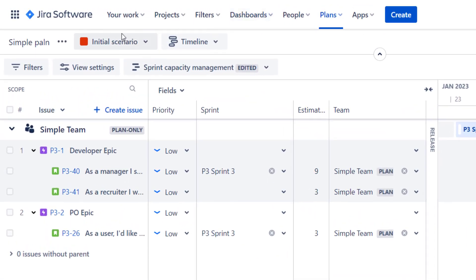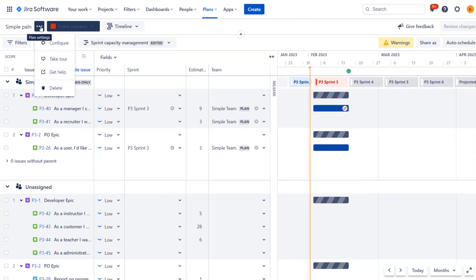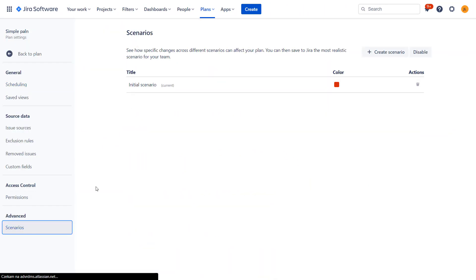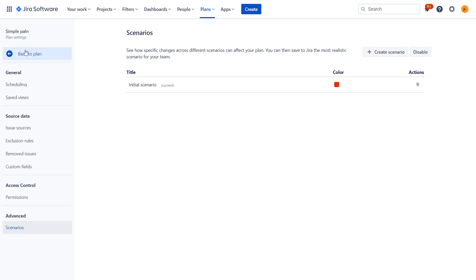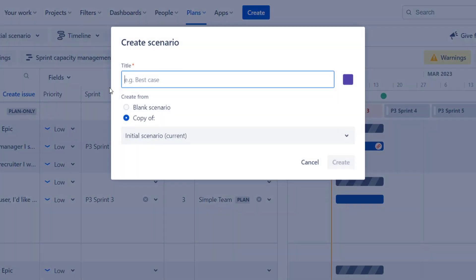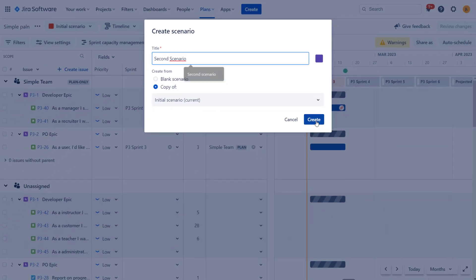So scenarios are available over here. You can see that at the moment I have only one. Although it is possible that right after you create your plan, this drop down will not be here. In that case, you need to enable this in configuration. There will be a button to enable it right here. If you have this, you can create multiple scenarios. So I could do this either from this screen or let's get back over here and create it here. Let's create it.